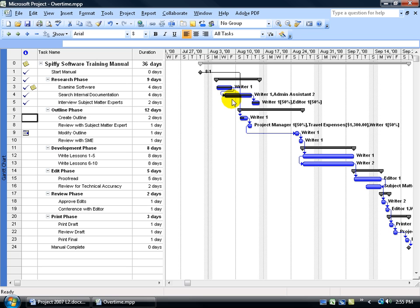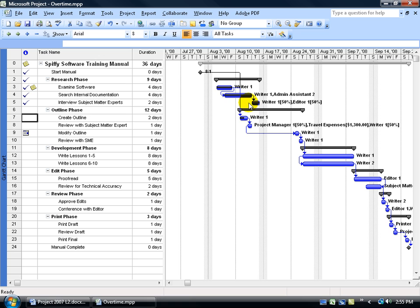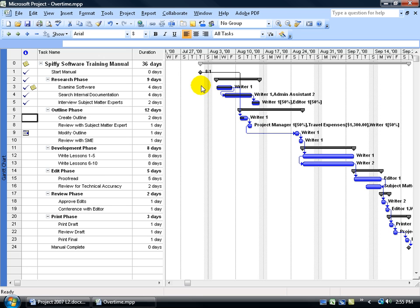Because Rider 1 working on both tasks at the same time, at least during that portion of time, is going to be over allocated. Not only that, but because these tasks here aren't directly linked up to this one down below, you can see that the Rider 1 working on this task is going to be working at the same time on that task as well. So in a perfect world, I would have this task finished, then start in the next task, then that task, and then go to the next one. And not have the relationships or links broken here, so it can continue on in a continuous format. The relationship that I like best is when this task must finish before the next task can start. In any case, in summary here, I wanted to show you that you didn't have to stick to that pattern, and that you can really have some challenging work on your project if you start changing your relationships or don't have them linked up in a nice easy to follow format.